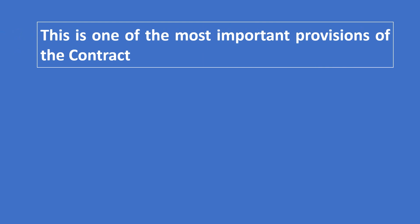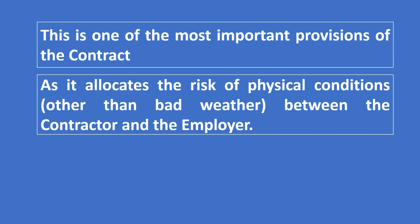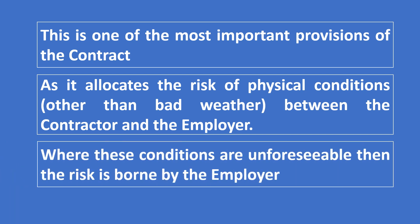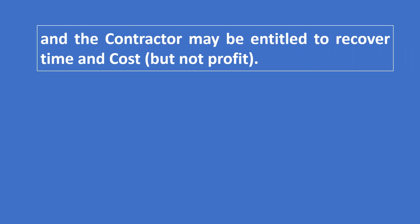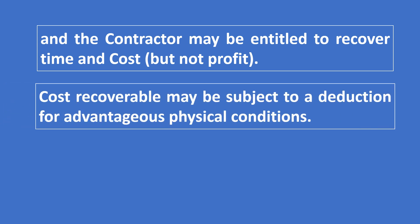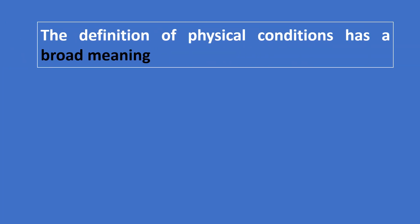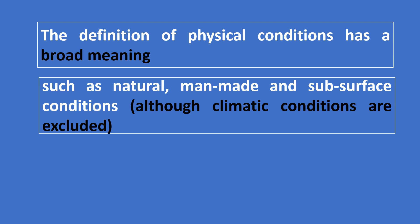This is one of the most important provisions of the contract as it allocates the risk of physical conditions - other than bad weather - between the contractor and the employer. Where these conditions are unforeseeable, the risk is borne by the employer, and the contractor may be entitled to recover time and cost but not profit. Cost recoverable may be subject to deduction for advantageous physical conditions. The definition of physical condition has a broad meaning, such as natural, man-made and subsurface conditions, although climate conditions are excluded.